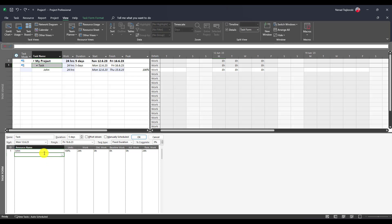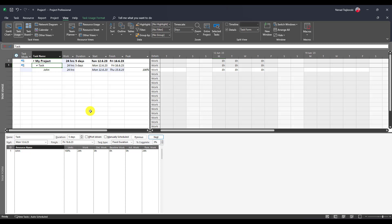If you have a fixed duration task and the resource is not available all the time, the work will be done and the effort will be calculated according to days in which that resource is available. Hope it helps and see you soon.